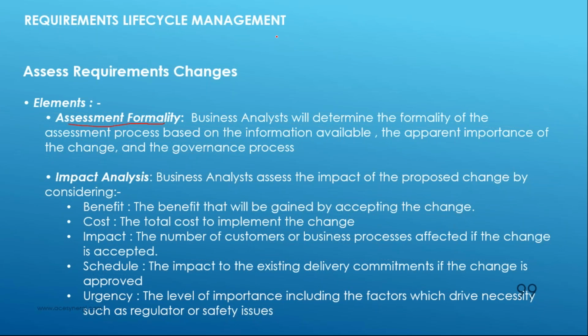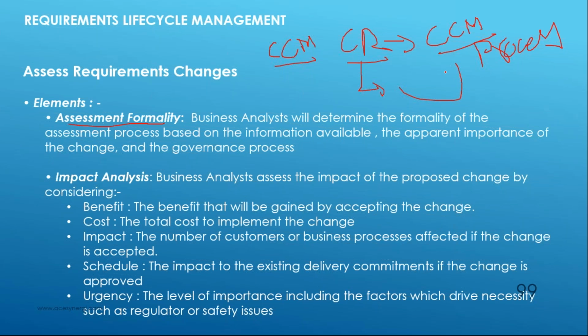You must have seen in a predictive approach, we have change configuration management boards. So whenever a CR comes into picture, the CR is subjected to a CCM process, change configuration management process, where the process is defined and stipulated. Before a decision is taken on the CR, it has to go through the CCM process, where you have already decided upon who will be part of the CCM group, who are the reviewers, who are the approvers. All such process is clearly defined.